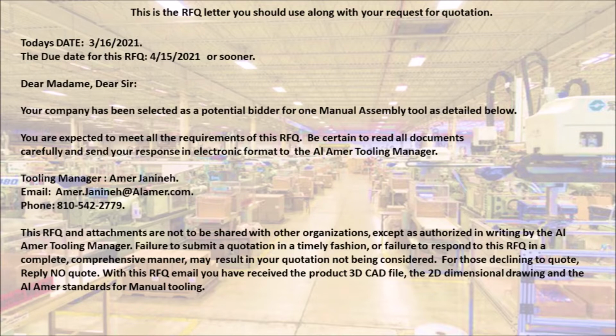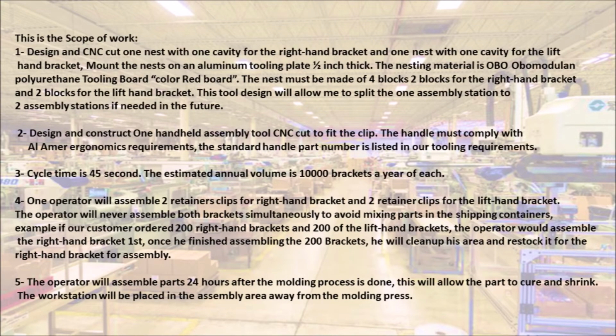Failure to submit a quotation in a timely fashion, or failure to respond to this RFQ in a complete, comprehensive manner, may result in your quotation not being considered. For those declining to quote, reply no quote. With this RFQ email you have received the product 3D CAD file, the 2D dimensional drawing and the Amer standards for manual tooling. This is the scope of work.